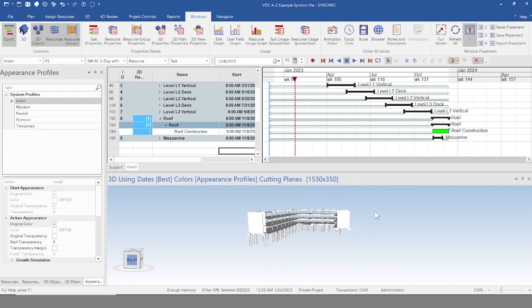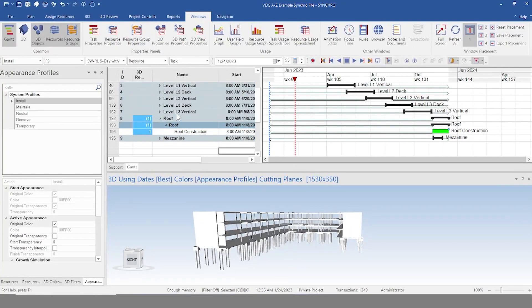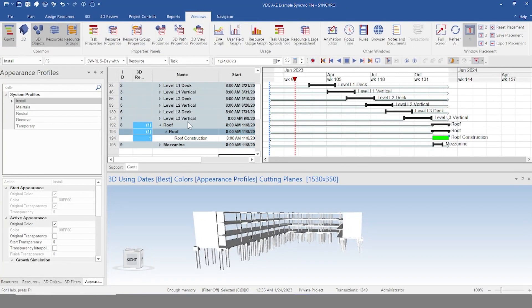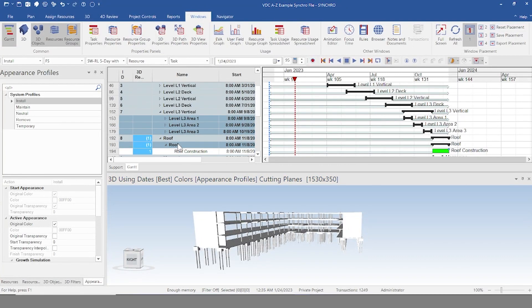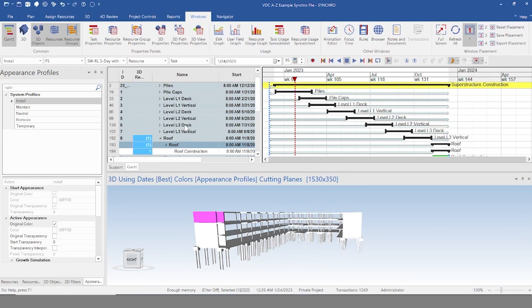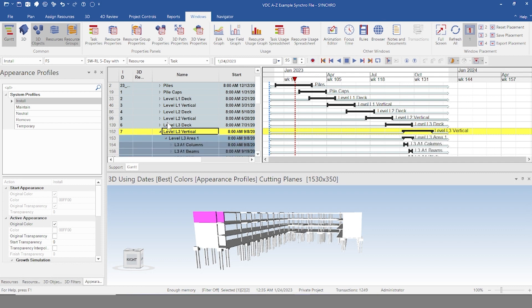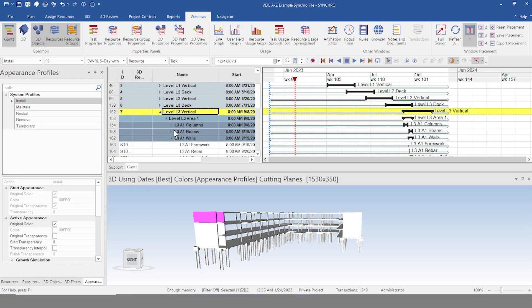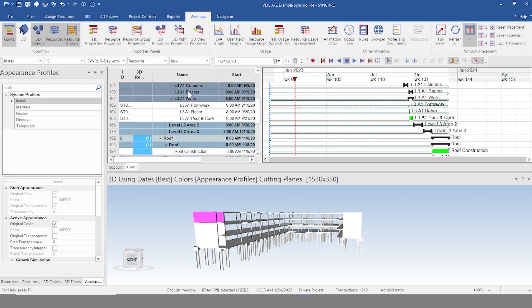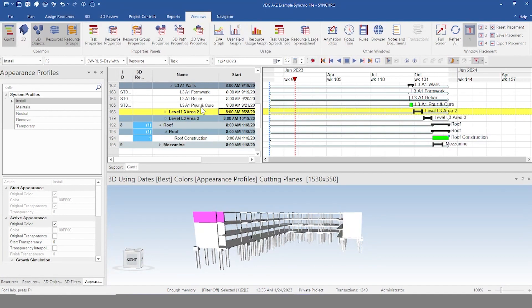Okay, so I'm going to go ahead and select some of these items. I'm going to go ahead and open this level three vertical. Start with that. So I'm going to start clicking on some of these upper walls here. I'm going to go to level three vertical. There we go, our walls. And if you'll notice in this schedule, we have our formwork, rebar, and our pour separated. And the reason for that is we're going to make different appearance profiles to signify which phase of the construction each of these areas are in. And that's really helpful for your 4D.